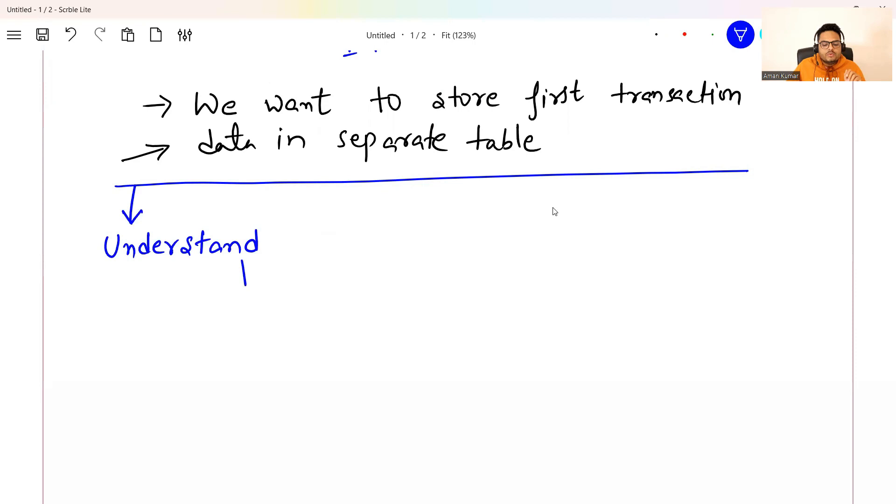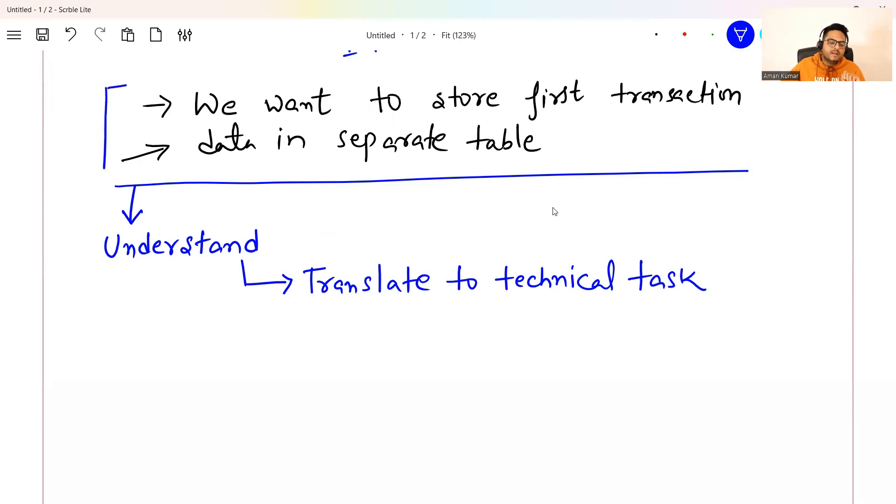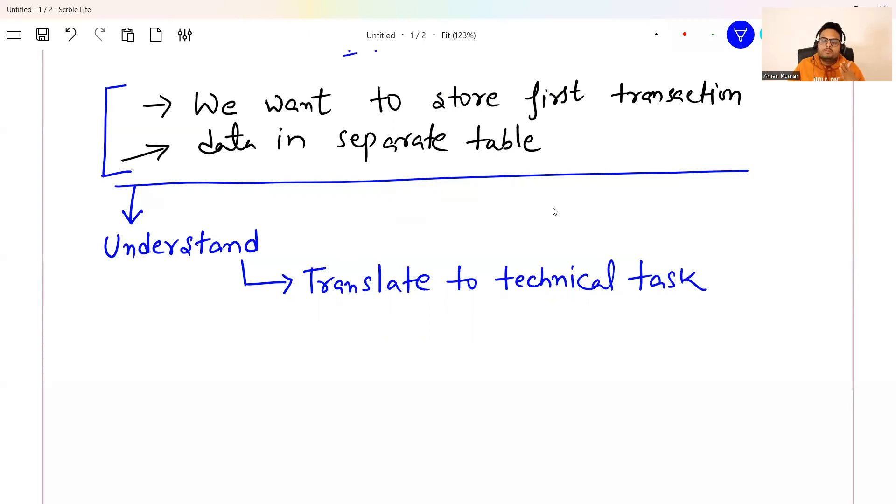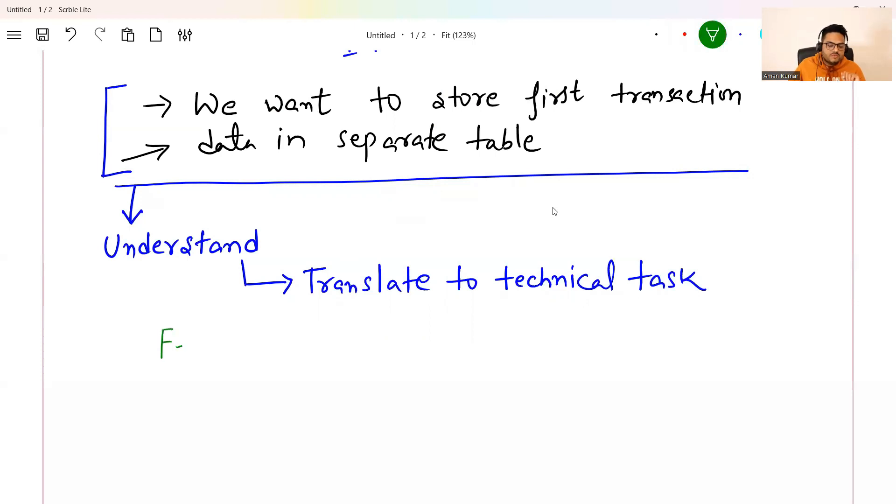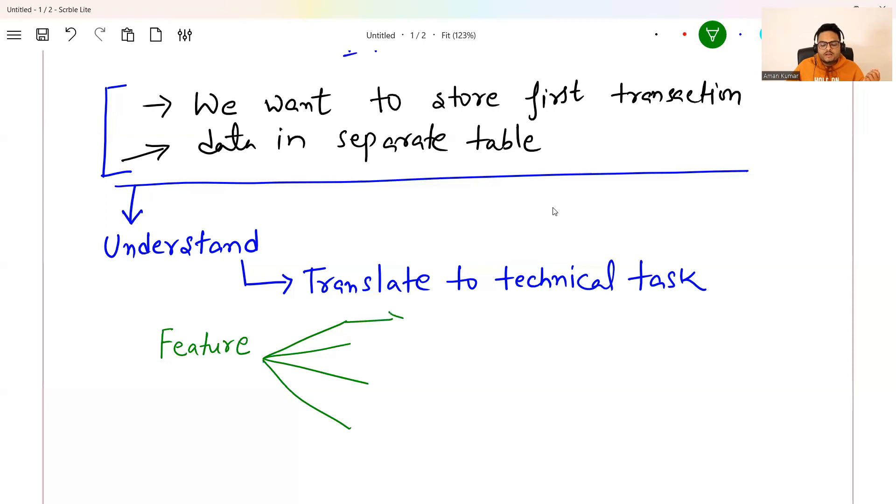This step two, after understanding the business requirement, is translate to technical task. Now, what is the meaning of translating to technical task, guys? So here, I have written just one liner or one statement. This needs to be translated to something through which developers can work on this or development team can work on this. So in the world of agile, in the world of Jira and in the world of stories, what they will create is something known as a feature. It can be a feature or it can be an epic also. So in a feature, there will be multiple individual stories.